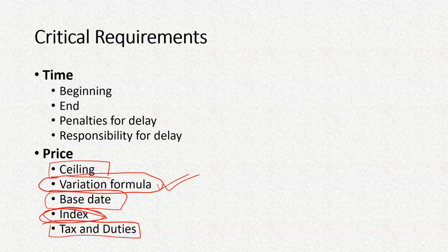If the tax paid by the client at the source is more, then the contractor will get some tax return, and if it is less, then the contractor will have to pay additional taxes. And how much tax will be deducted with each bill, and all those things will again have to be included.